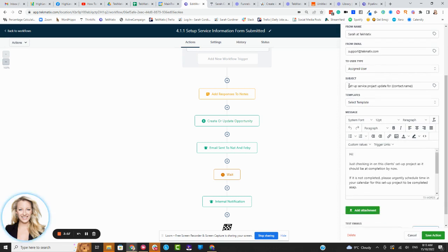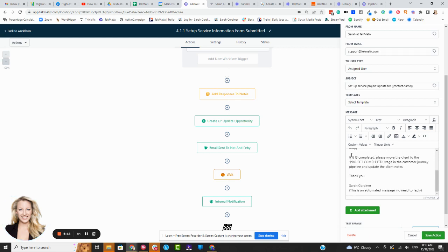We're going to send it to whoever the assigned user is. So whoever's been assigned this particular project will receive this email. And it's just saying, hi, just checking in if this project has been completed. If it's not, please schedule time in your calendar urgently to get this job done. If it is completed, please make sure you move them to the project completed stage in the customer journey so that we know this project's completed.